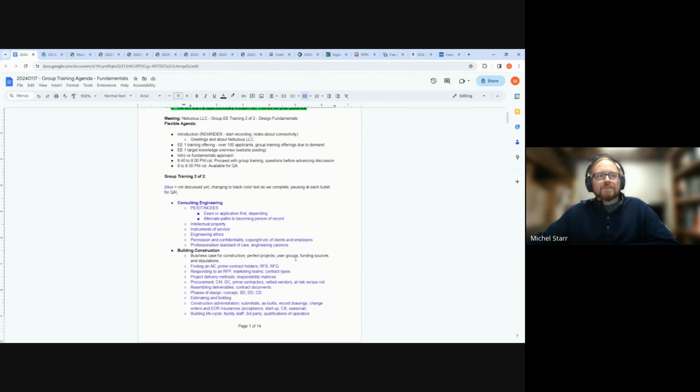And so companies can go seek those out to pay for part, or maybe all, of the case for building the building they need to build. With that comes stipulations. So Buy America is one that's commonly used, that then causes the design team to make sure, and that's the word, I guess, to make sure, because the funding sources always come with the criteria, and also the receipts, or the way that you can prove that you did follow the reason that they said that you could spend the money.